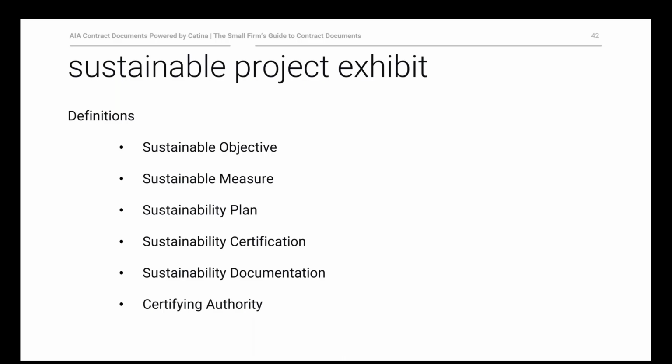The exhibit also talks about how to handle the responsibilities associated with obtaining a sustainability certification, like who's going to handle what if we're submitting to USGBC for LEED or whatever. How's the sustainability documentation going to be handled, regardless of who the certifying authority is? Who's going to be responsible for compiling the documentation that needs to go to them, or the continuing obligation to submit after the project's complete, if you need to do that to continue to have the certification, and who's going to deal with the certifying authority.